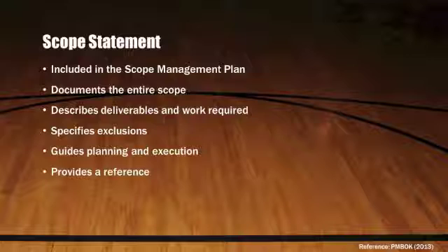Our group's fully developed scope statement was included in the scope management plan. The scope statement documents the entire scope of the project and is more detailed than the scope description in the project charter. It describes in detail the project's deliverables and the work required to create those deliverables. It also will specify all exclusions in order to set realistic expectations among the stakeholders. The scope statement helps guide the planning and execution phases of the project. And finally, it provides a reference for evaluating change requests to determine whether they fall inside or outside of scope.